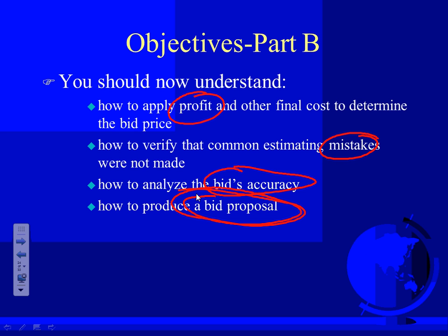So here's how you're going to be taking a receptacle in a commercial building, Adam. You're going to take it as a receptacle, a cover, a mud ring, and a box, all in one. Did you guys hear me? This is called an assembly. That's how you pick them up. So you're going to be asking me, Chad, where can I find this assembly? Always work with the word assembly.